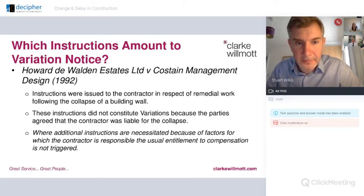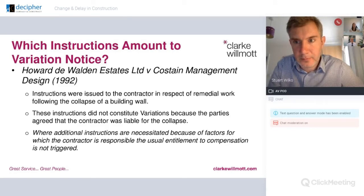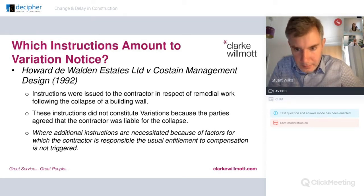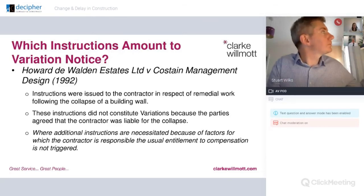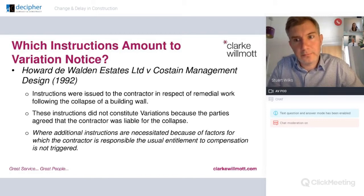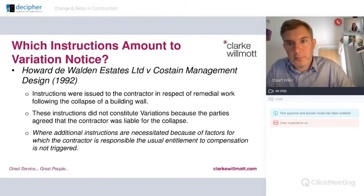Thank you, Stuart. I was just going to build on what Bill said about the importance of understanding your contract. Under the Construction Act, Section 115, the parties are free to agree on the manner of service of any notice or other document under their contract. If you don't agree it, then it's any effective means. We often get asked by clients serving an important notice: how do I do it? The starting point is always your contract. The courts and statute are very clear on that, and it really can be as extremely specific as you make it.